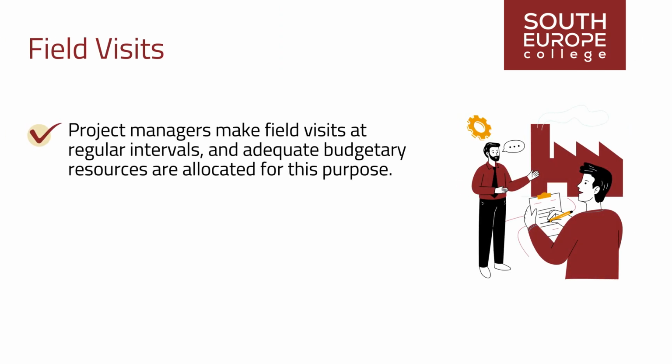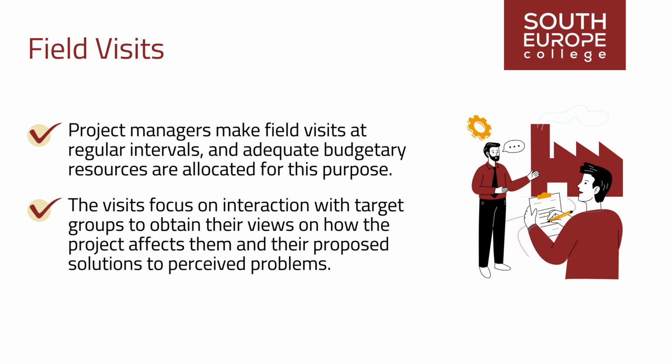Project managers make field visits at regular intervals, and adequate budgetary resources are allocated for this purpose. In addition to inspecting the sites, physical outputs, and services of the project, the visits focus on interaction with target groups to obtain their views on how the project affects them, directly or indirectly, positively or negatively, and their proposed solutions to perceived problems.